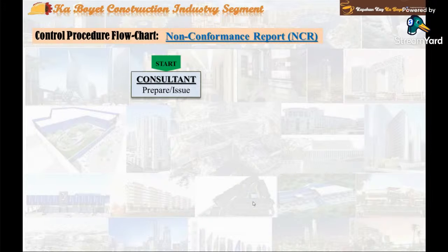The consultant document controller, upon approval of the resident construction manager, registers the NCR to the standard project NCR log registry and then formally transmits the NCR plus all attachments to the contractor and copy furnishes the owner, the project architect engineer, the responsible designer, and the QS consultant. The output document is an open NCR with necessary attached documents.